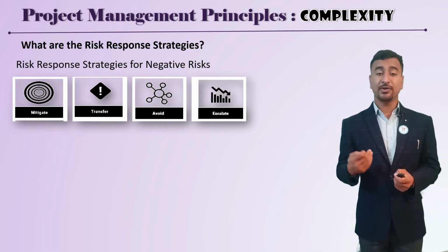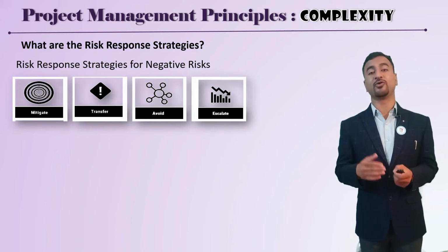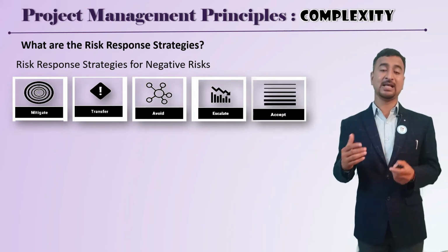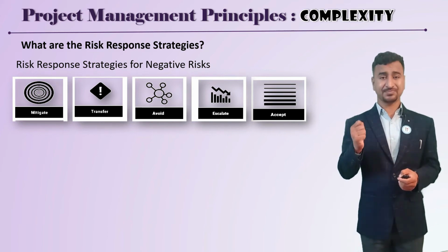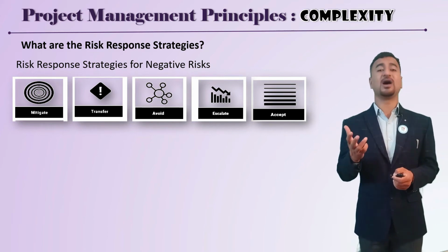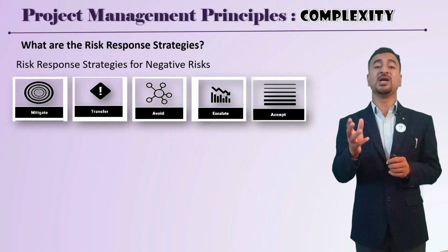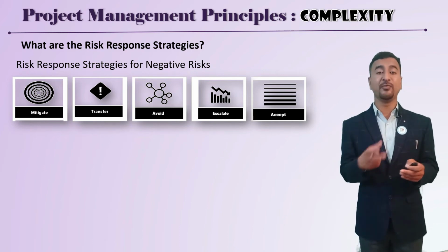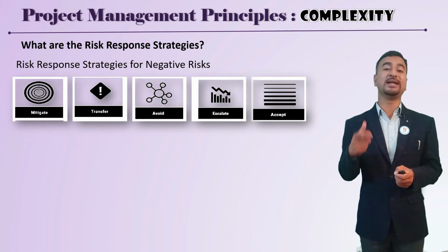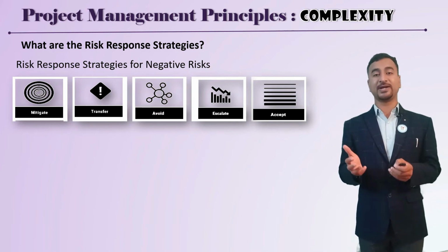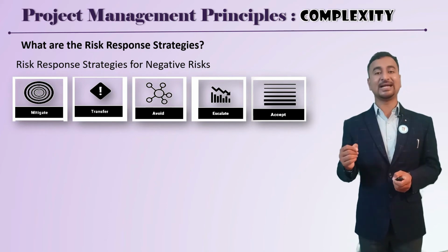And finally, you can escalate that risk to the higher authority, because it's not in your control. Then escalate to the higher authority, and finally accept that risk. Like you design and implement all that, but beyond that there is some residual risk, like the probability of an earthquake happening. So you accept that. You cannot control that. You cannot define a strategy, because cost benefit analysis also plays a pivotal role. In mitigating that risk, the cost of implementing that strategy is so high that you cannot incorporate it, but simply accept that risk. But you have registered that in the risk register.